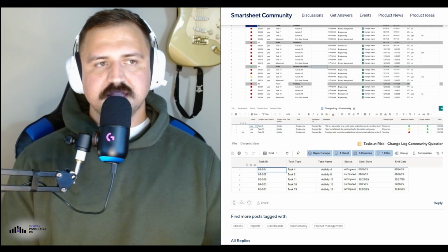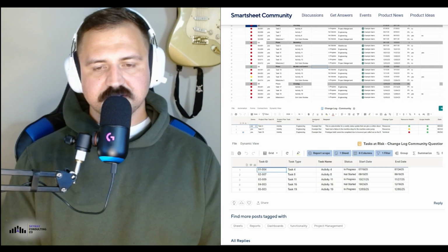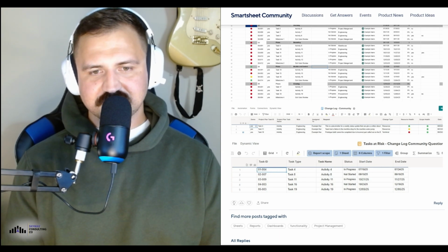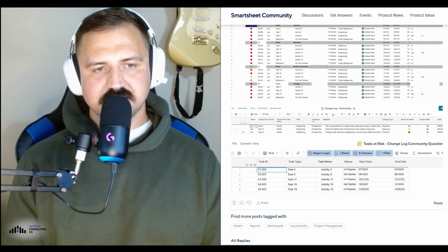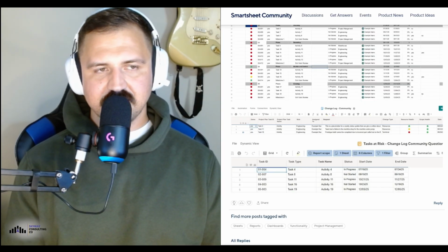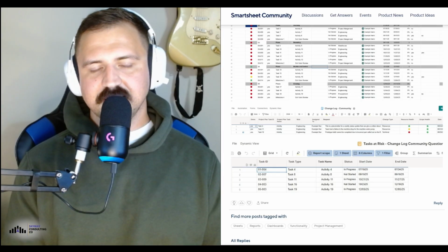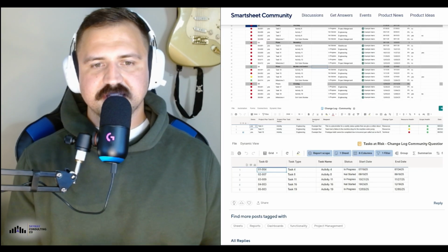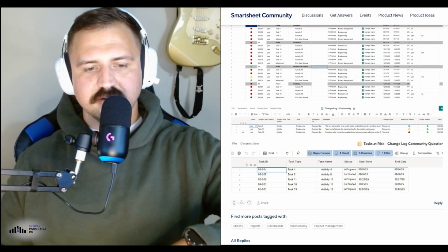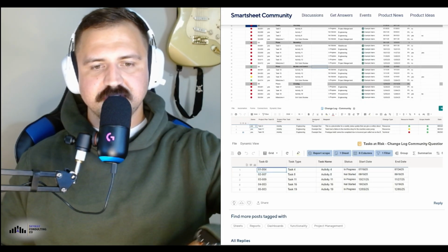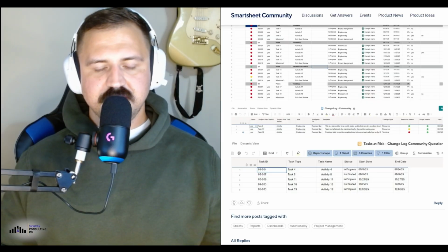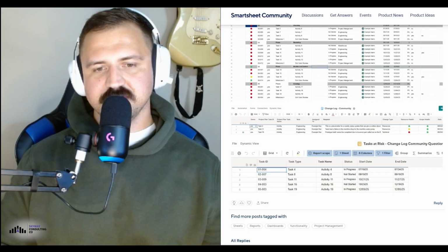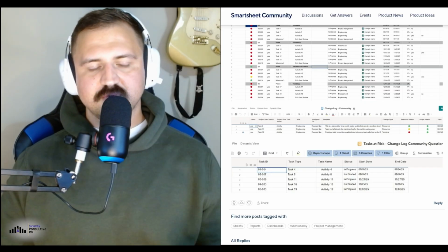So my thoughts are we could use a join collect function that is somewhat embedded in that way, looking for an index sort of join collect, some sort of formula like that that's going to go into the CRAID log, find the task ID associated to it, and bring in all of the relevant information for each one of those CRAID items, and then we'll be able to see it.